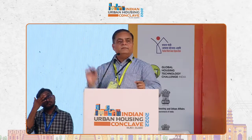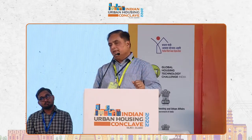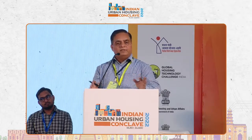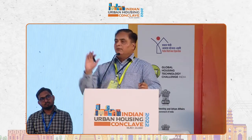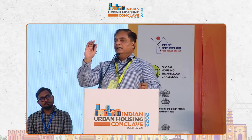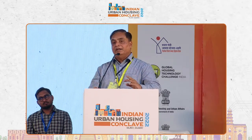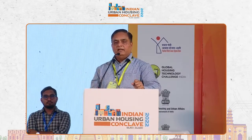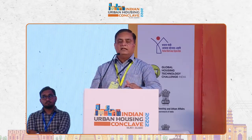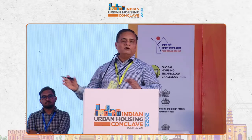The first issue is that, sir, the state government, PWD, has not yet notified the schedule of rates for this kind of technologies. Some states will take a bold step, okay, let us go ahead and we will do some turnkey project. The moment you go for a turnkey project, after 3 years a big letter will come from CAG asking under which schedule of rates you prepared this estimate and how it compares with the rate quoted by the contractor. That is the second impediment. The third impediment is that there will not be any specifications, or if there are specifications, there may not be relevant tender schedules or tender documents for this kind of thing.